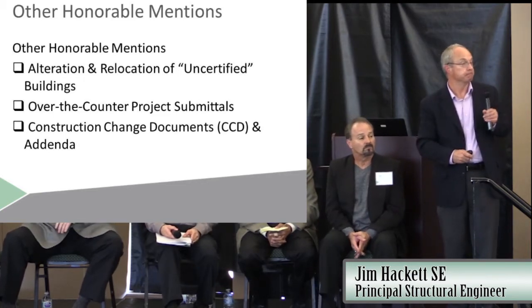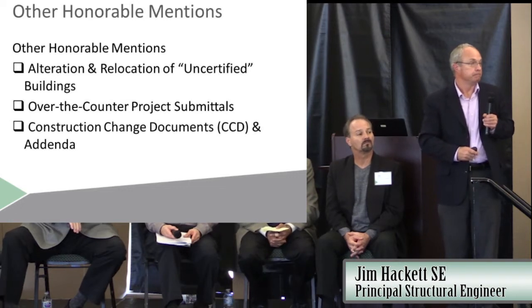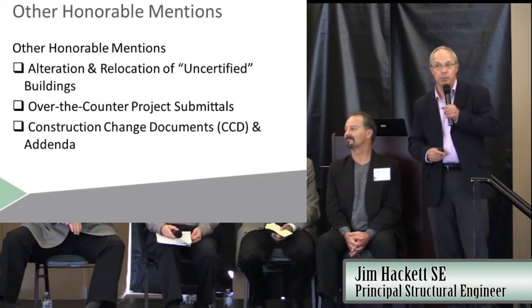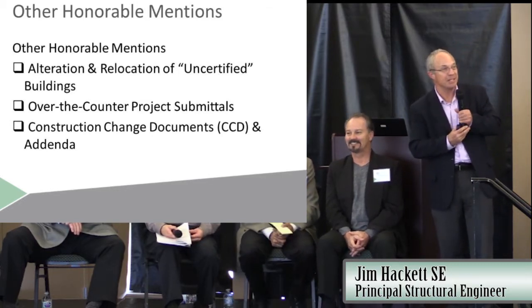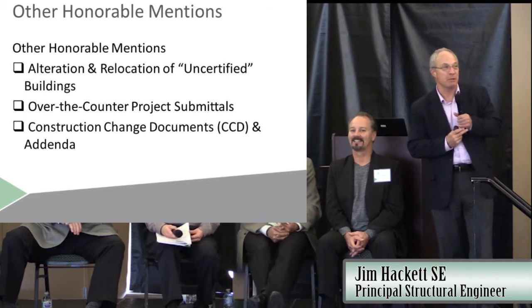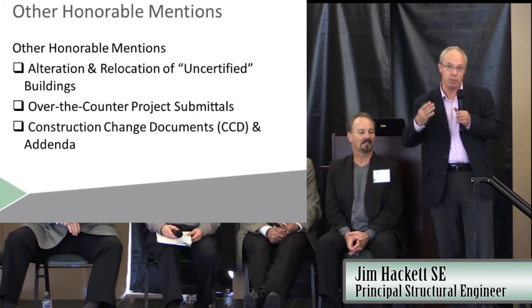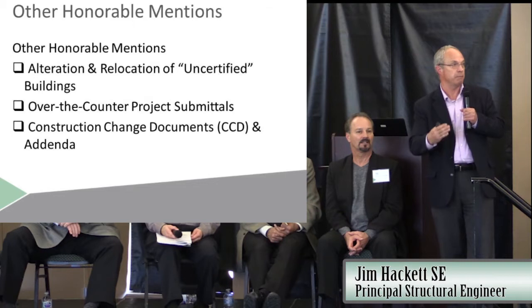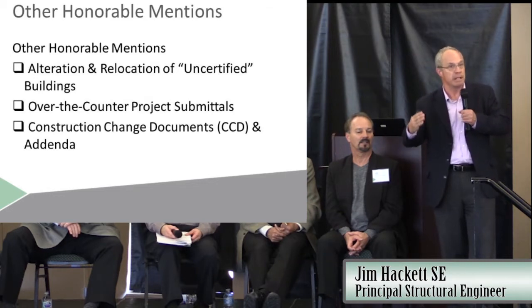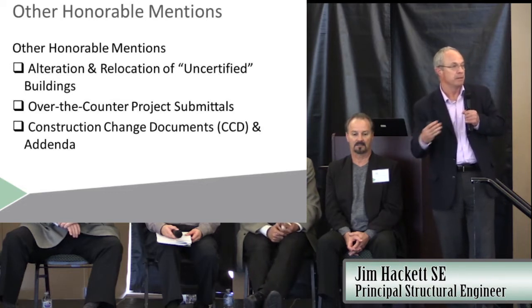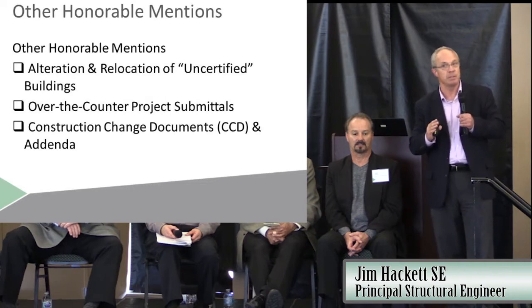Question? What do you do about buildings that predate DSA, where you have no certification on them? What do we do about buildings that predate DSA? Very interesting. There is something called the Garrison Act that was passed back in the 50s. Any building that was not certified by DSA prior to 1971 was to either be taken out of commission or to be rehabilitated. So if you have a school building that was never certified by DSA and it was pre-1933 or 1935,